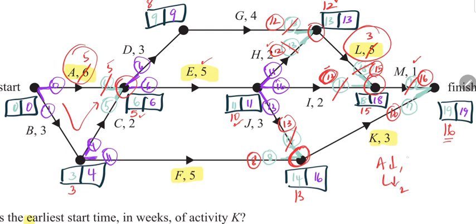So this one multiplies by 140,000 and this one multiplies by 120,000, so this is times 2 and that's times 1, and if we add them both, we get $380,000, sorry. So that's one way, which is a targeted approach of doing it.